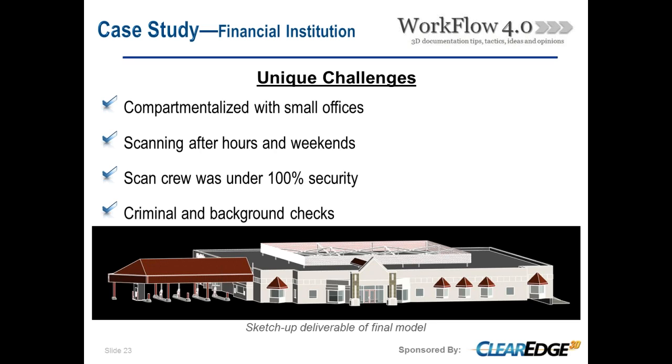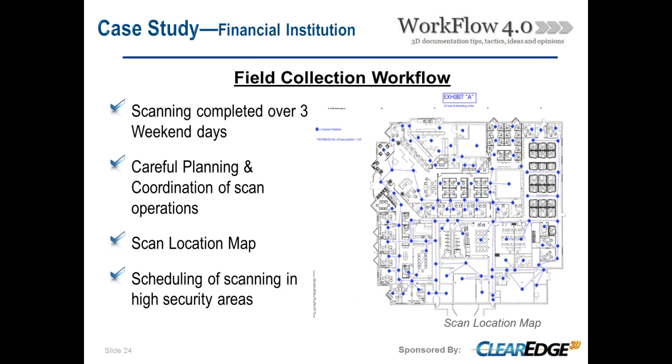And our scan crew was under 100% security for obvious reasons. And lastly, we, the company and the staff on site, had to go through criminal background checks. As you can imagine, that was completely understandable for a project with some sensitive data in there. So it was kind of an interesting endeavor to go through. It took a lot of time to even get to the point of doing the actual scanning.